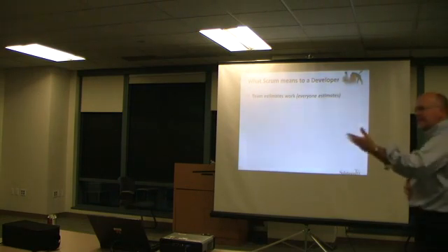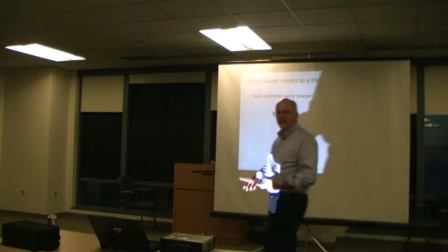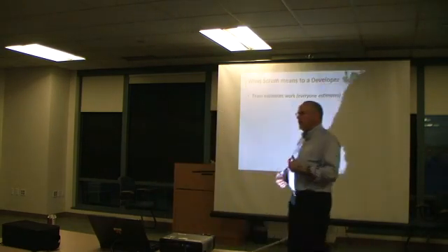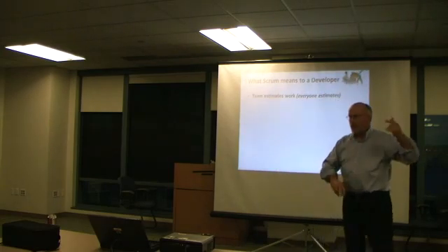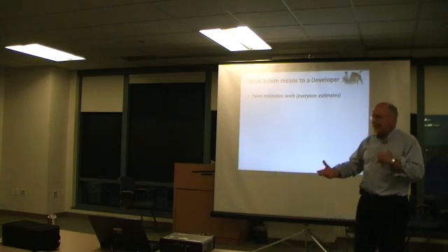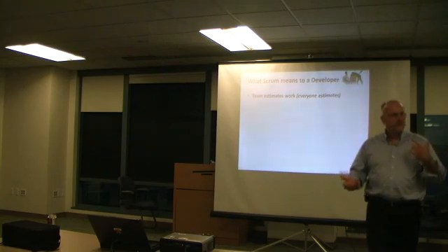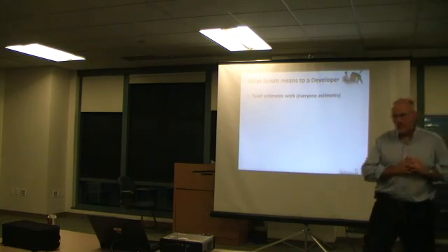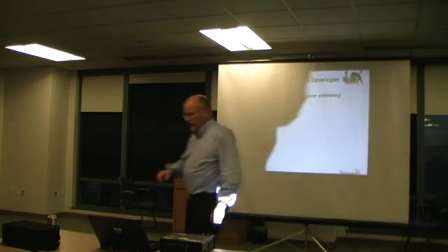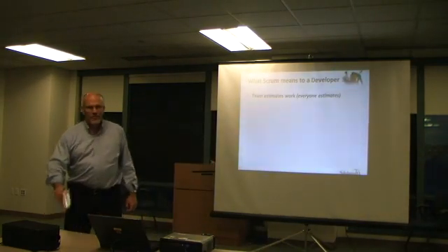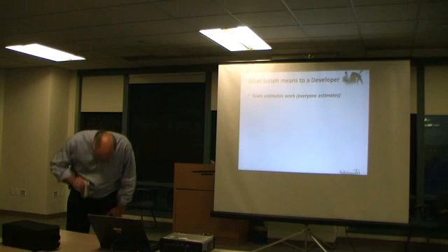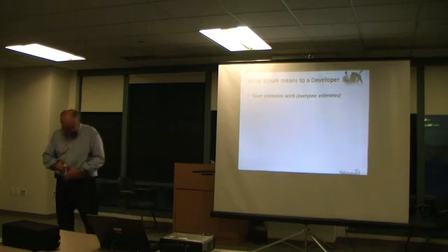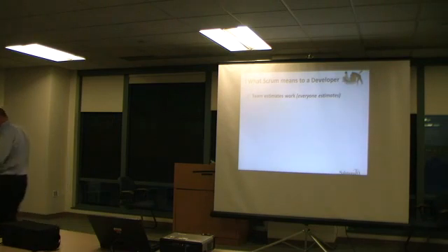And it's the classic thing of let management have some information, let them have some facts, then they can start to deal with, do I move scope? Do I de-scope? Do I add capacity? Do I change my commitments? And this is really where, the hardest thing that you will ever do is look at yourself honestly without any positive bias of, your mother told you you were a good person. Well, that doesn't mean a whole lot at the end of the day.